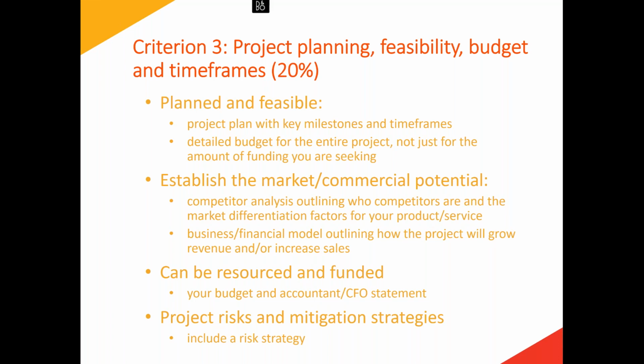If you actually start mapping out what you're going to try to achieve in terms of the activities, the resources, the milestones, if you map that out first, it actually makes writing the rest of your application a lot easier, because then in terms of writing all the other sections, you're justifying your plan. So we see people try to do it the other way around, and the plan's a little bit of an afterthought with, I'll call them sloppy milestones, and things like that don't really hang together well from a project perspective. So it's just a hint: if you do your project plan first and then write the rest of it around it, these proposals tend to hang together a lot better.